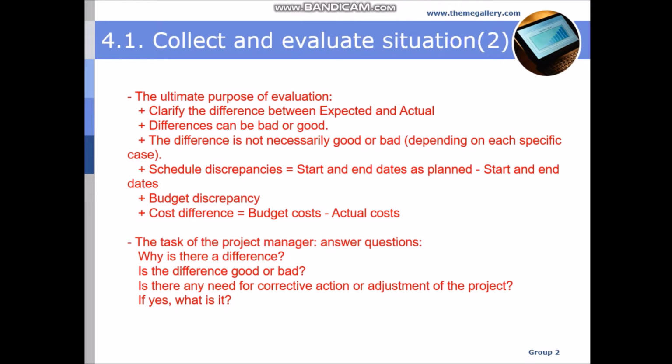The ultimate purpose of evaluation: clarify the difference between expected and actual. The difference can be bad or good. The difference is not necessarily good or bad. Schedule discrepancy equals planned start and end dates minus actual start and end dates.